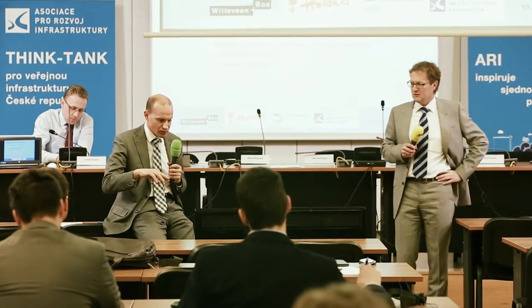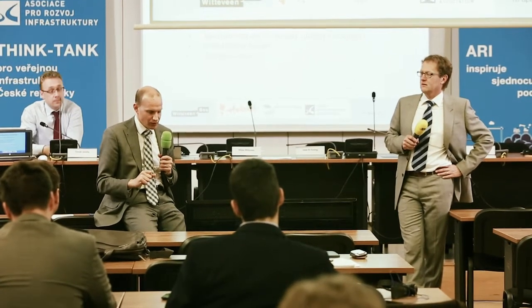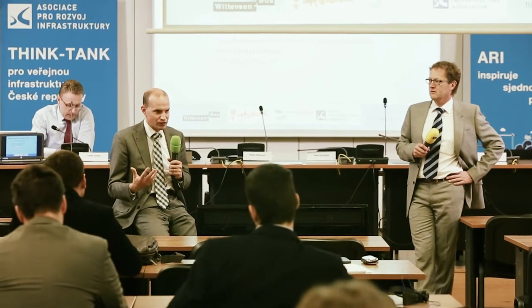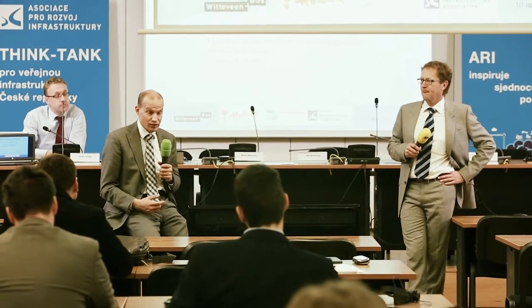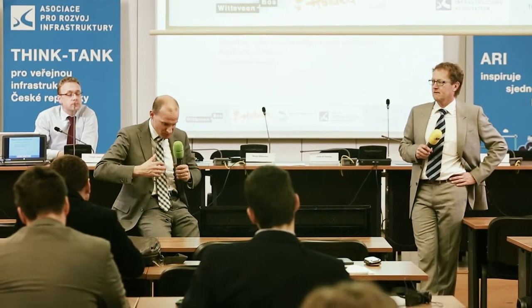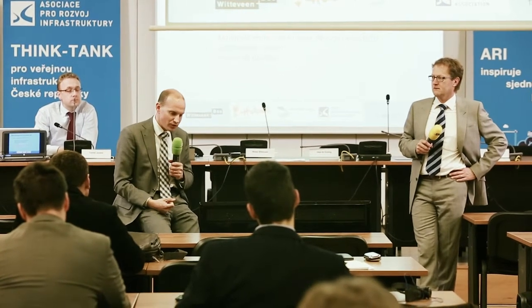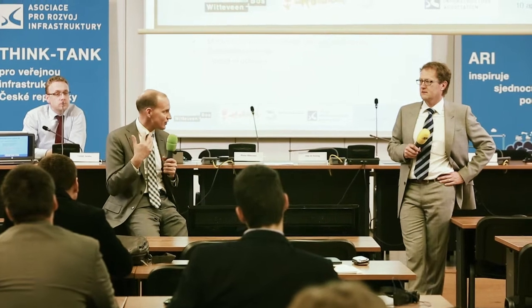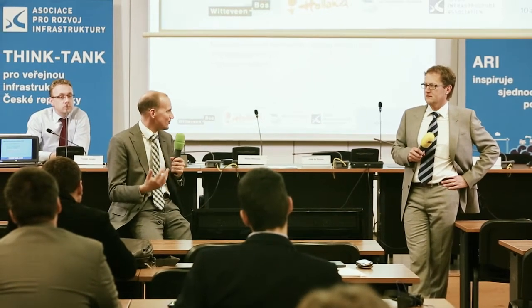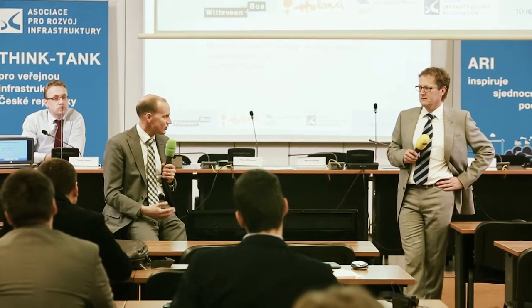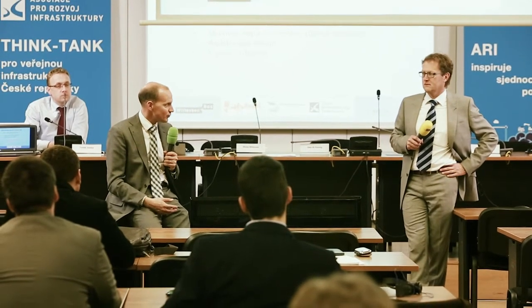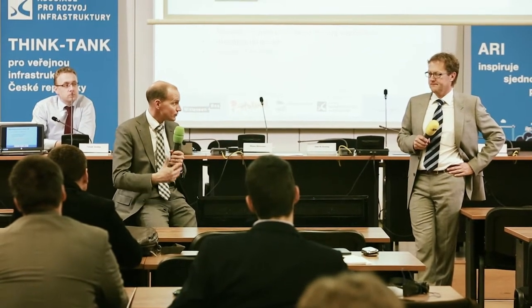I have some experience. I did a tunnel in Utrecht, and in those days, we did 15% of quality. And we thought that was really tough because it was the first time we did it. But in the end, we ended up with the lowest price contractor. If I look back at that experience, it's logical, but at this time, we didn't know that. So I would say 50% or more, at least, to start with.